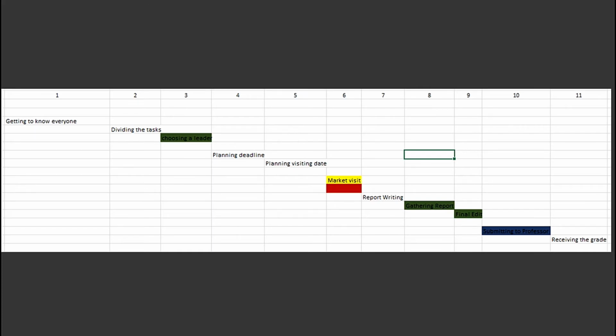There are much better looking charts out there, I know. Microsoft Project also uses Gantt chart if I am not mistaken. Now, if you see here, you can notice that I have numbered the top row. This is where the dates are going to be, and some of the cells are color coded and some are white. The cells that are white indicate that all of the group members need to participate in that task, and the color coded cells mean that they are to be performed by a single or a couple of members. This is the way of scoping a project that is going to help us visualize the tasks to be performed by individual members and the dates they are to be completed by. For the sake of visualization, I like this one better.